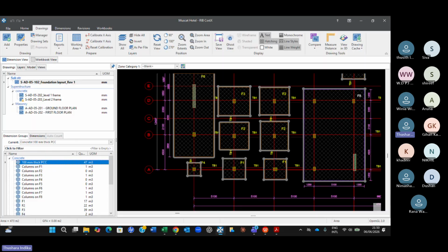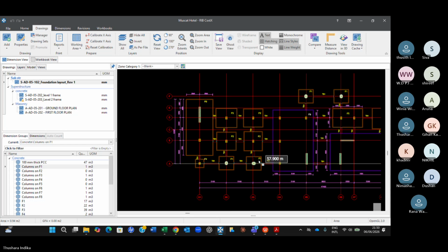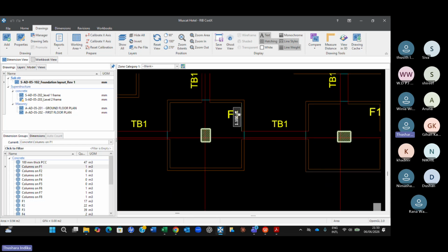So let's go to one footing here, footing F1, this one here, right? What we are going to introduce is an equation to get the PCC directly when this line is not drawn on the AutoCAD or PDF. Sometimes people draw an offset on the AutoCAD drawing, then mark the PCC and get the area. That is possible, I'm not saying that is not possible. But let's say you don't have this line and you have to calculate the PCC area from the footing area.